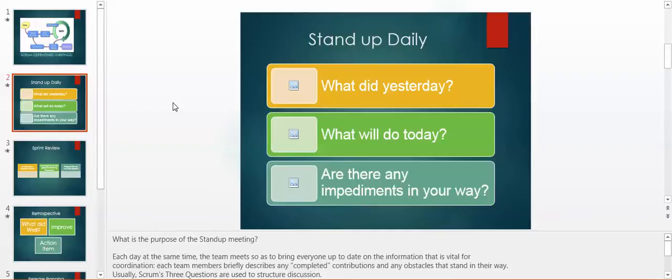Usually Scrum's three questions are used to structure discussion. What did you do yesterday? What will you do today? And are there any impediments in your way?